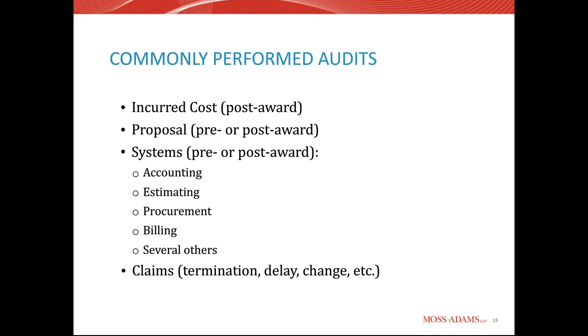The reason for auditing the proposal on a pre-award basis is it serves as a basis of negotiation for that contract, that an audit has been done of the estimates and the amounts included in that proposal. It's a very important audit that should be considered anytime either a prime contract is being negotiated with the agency, or a subcontract is being awarded by a prime contractor. We think there are often times when that should be done, and we don't always see that happening, so there's a concern there.